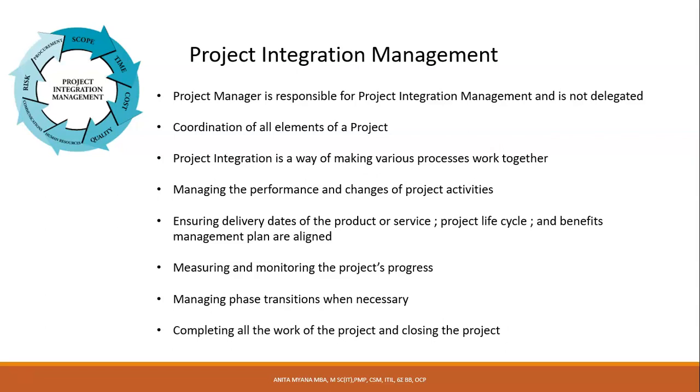Completing all the work of the project and closing the project. That means the project manager has to ensure that all the activities of the project have been carried out successfully, and finally the project manager has to close the project by archiving all the project related documents which would be useful for future reference, and archiving the acceptance sign off from the customer.